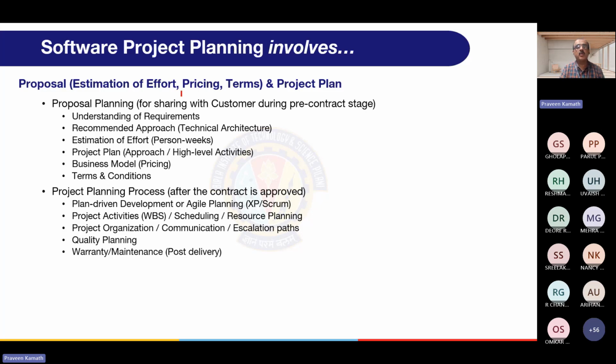Proposal: estimation of effort, pricing, terms, and project plan. Proposal planning for sharing with the customer during the pre-contract stage. Understanding of requirement, recommended approach, technical architecture, estimation of effort in person weeks, project plan, approach and high-level activities, business model, pricing, terms and conditions.